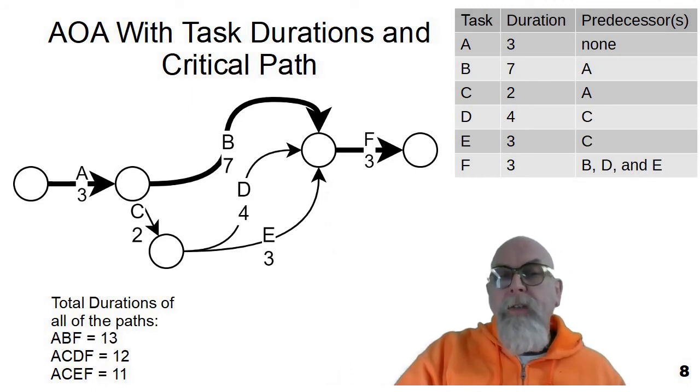The durations, if we add the durations up on the three various paths, we can see that the path ABF is 13 units long. The path ACDF are 12 units long. And the path ACEF is 11 units long. This tells us that the critical path, the path that if there's a lengthening of a task, the whole project will get lengthened, is called, is ABF for 13.